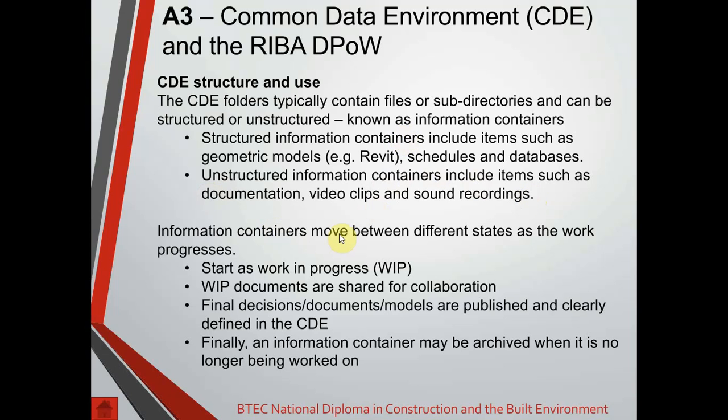Those information containers move between different states as the work progresses. When they start, they're known as work in progress. Everyone will know that if they're looking at those within the CDE, they are work in progress, they are not finished. They might be shared for a bit of collaboration at the start, but they're not the end product.